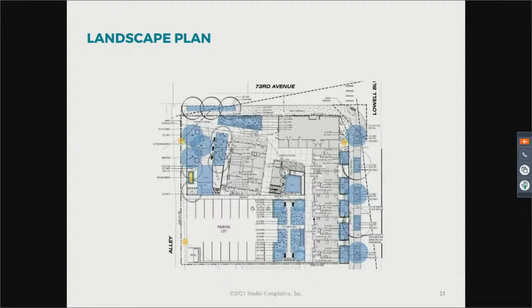So we can't use what is sometimes referred to as the Excel 1% funds solely for that project because there's so many secondary services off of those overhead lines. So those have to be paid by a separate fund. They cannot be paid out of the 1%. And so that will require the city to match in order to underground the overhead service from a building to the primary.